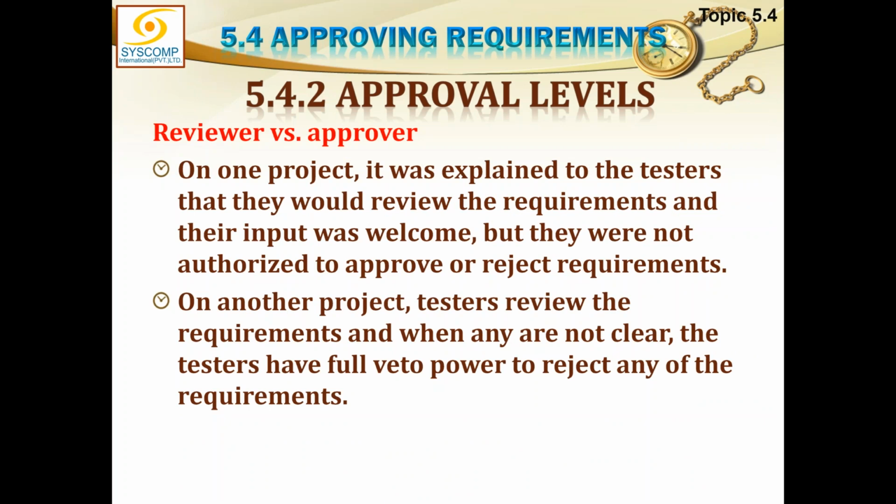Reviewer versus approver. On one project, it was explained to the testers that they would review the requirements and their input was welcome, but they were not authorized to approve or reject the requirements. So a reviewer is not supposed to reject or approve. They are just supposed to review and submit their report. The decision to approve or reject lies with the boss.